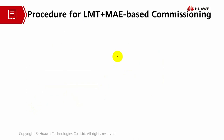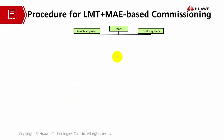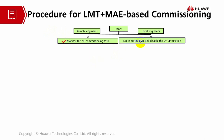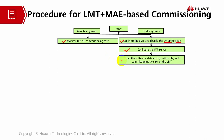The procedures for LMT and MAE-based commissioning also happen between remote engineers and local engineers, continuing from what we discussed earlier. After you start the commissioning task, the remote engineer will monitor the NE commissioning task. At the same time, the local engineer will log into the LMT and disable the DHCP switch so that there is no interruption to the transport during commissioning.